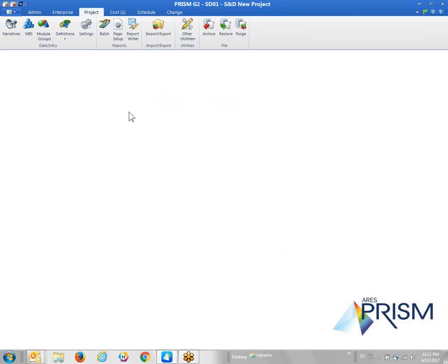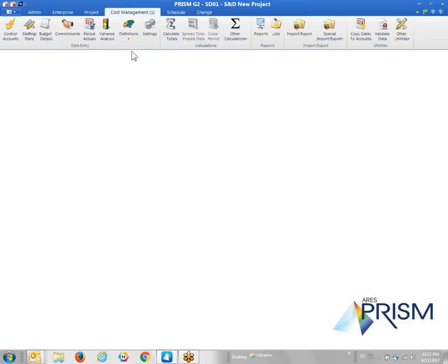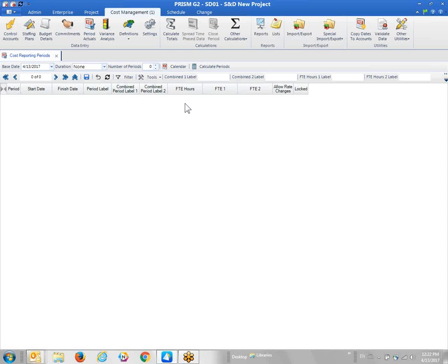Now I also want to start with a new project. I want to indicate the project reporting periods. So I'm going to go into cost and look at definitions and set up my cost reporting periods. And here it's suggesting today's date. I'm going to say, well, actually, the 10th of April is the start of the project. We're beginning this week. We're going to report progress once a week.